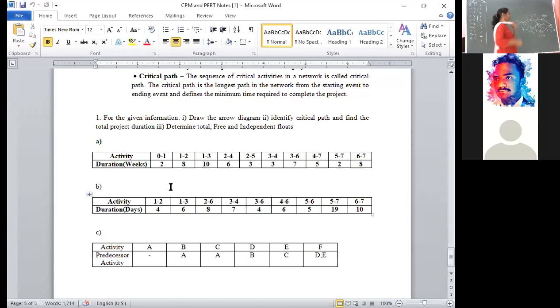Okay, listen, one more rule here. We have to calculate, here the earliest to finish is E7. This is the finished event. Then the earliest to finish is equal to the latest to start. Whatever the end node value, we will take that as the latest to start.